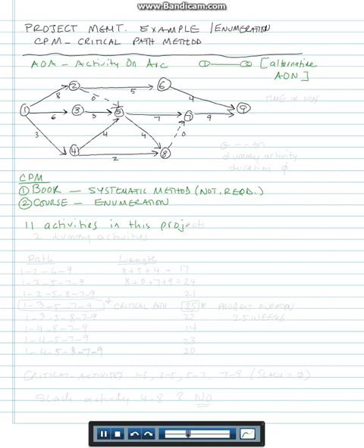There are two activities that are dashed. A dashed activity like this between two nodes is considered a dummy activity. A dummy activity is an activity that is used just so we can have a better representation of other activities in the network, so that arcs don't cross each other, basically. It has a duration of 0. So two activities are dummy. But we still use them when we are listing our paths.